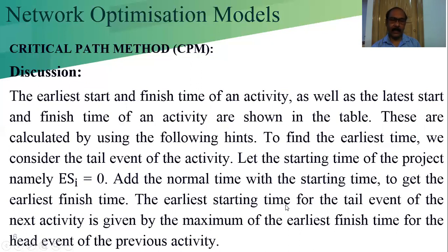The earliest start time for the tail event of the next activity is given by the maximum of the earliest finish times of the head events of the previous activities. We already learned how to calculate the earliest start time, earliest finish time, latest start time and latest finish time by using the forward pass and the backward pass method.